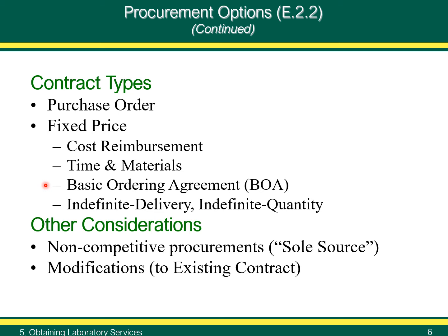The BOA defines the analytes, costs, methods, APSs, MQOs, and any other parameters required, as well as required sample throughput and turnaround times. An agency can use a BOA to send samples to one or several vendors, depending on needs and laboratory capabilities.